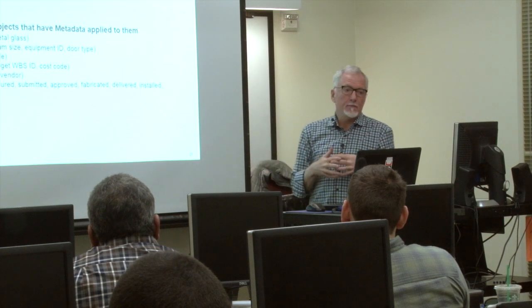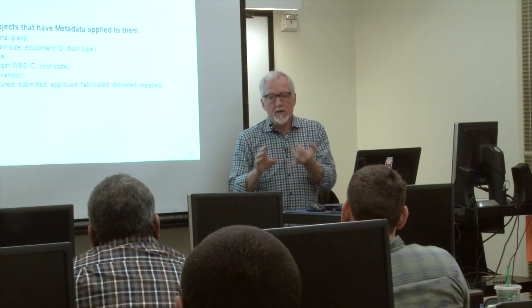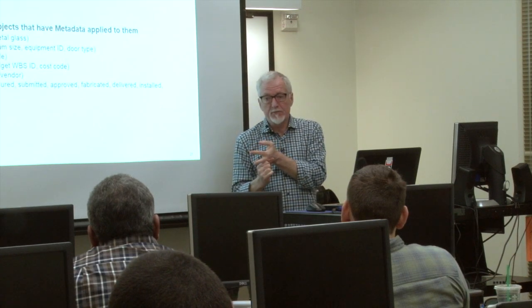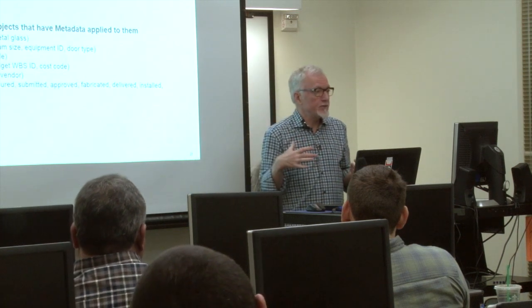Or we can set it up for status. We can say, what are the things that we've signed subcontracts for? Or what are the things that have approved submittals? Or what are the things that are installed already versus the things that are not installed? What are the things that are delivered to the job site ready to install?